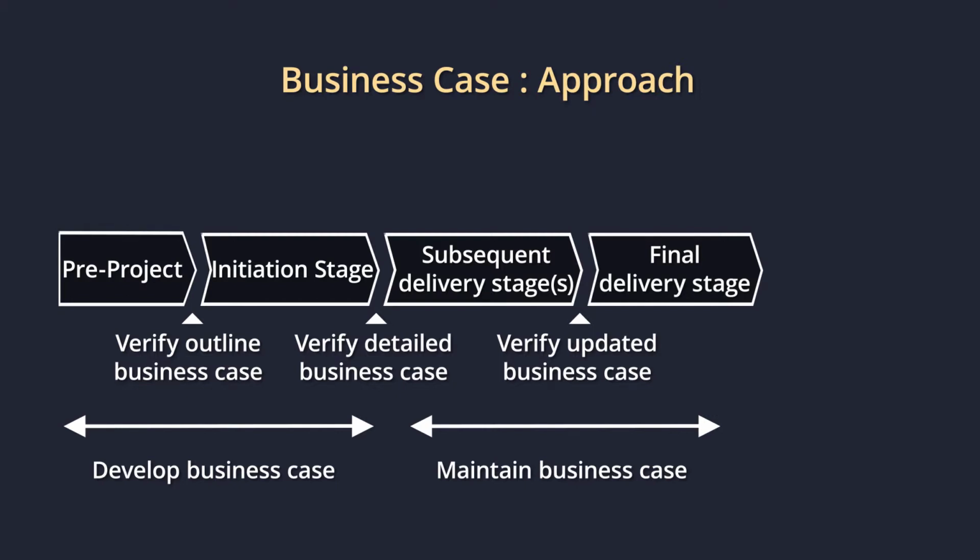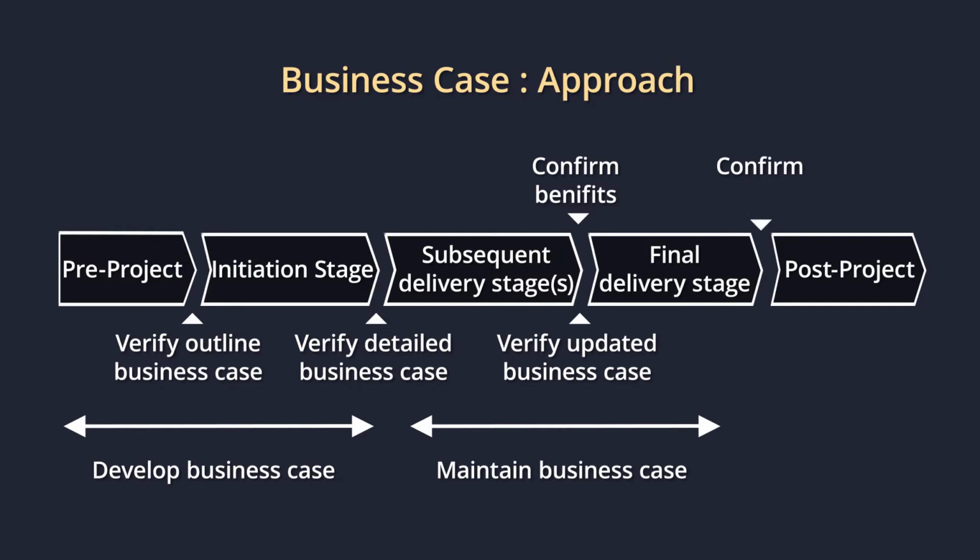At the end of each stage, as defined in the business case, the benefits are checked and confirmed before moving to the next stage. At the end of the project, all the benefits created during the project are consolidated and confirmed in comparison to what was actually defined as part of the business case. All the benefits created throughout the project life cycle are checked in consolidation and confirmed before the completion of the project.